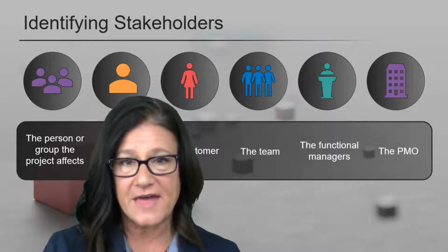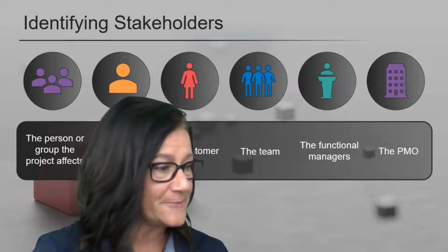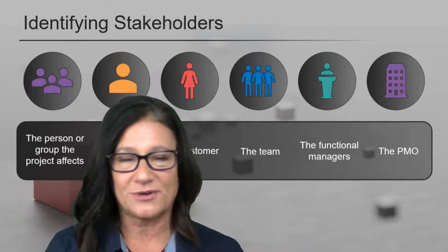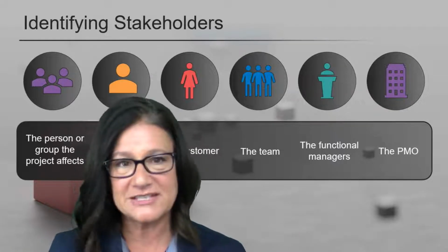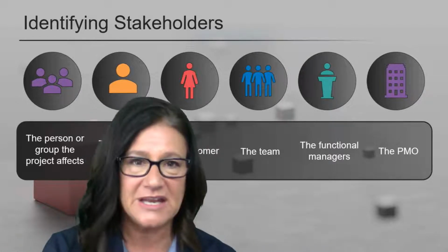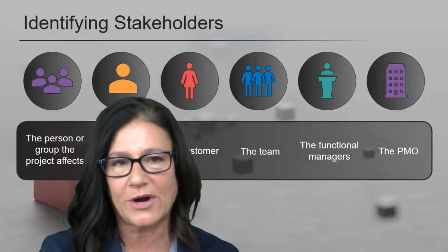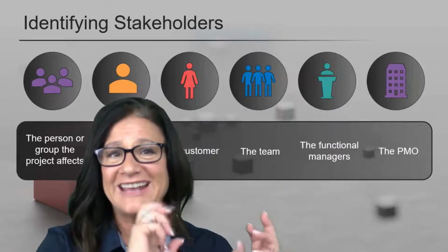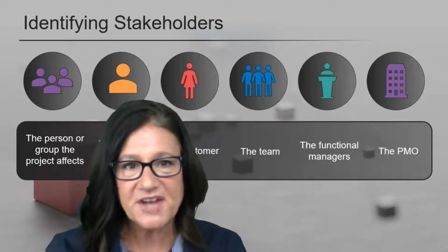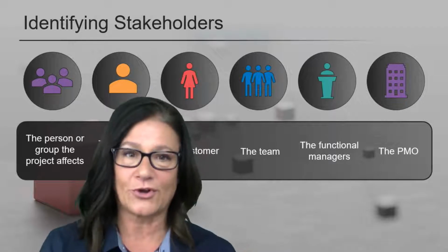And so the flip side of that, when I would be both an end user and a stakeholder, would be, let's say I am the HR department director or something like that. And I go to the IT department and I say, look, we need a new payroll software, right? Can you investigate it? Here's our budget. Here's what we need it to do. Here's the calendar that we're looking for, ease of use, cost, etc. Here's all my requirements for this software. Now go forth, find it, buy it, install it, and teach us. So the IT department goes out and does that, right? Meets the requirements, installs it, teaches them, project's over. HR is now the end user, but they were also a stakeholder.